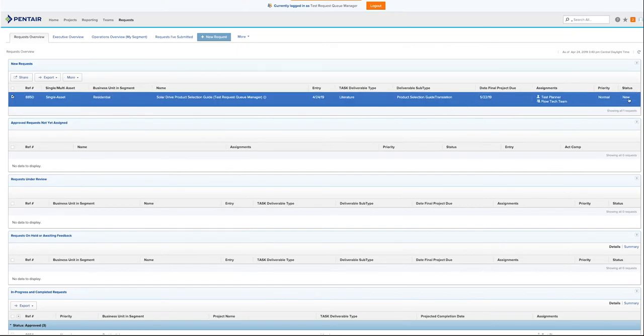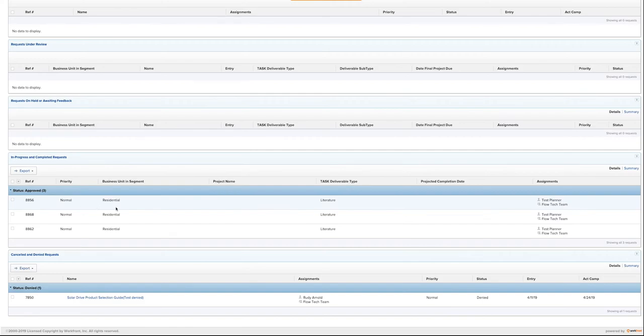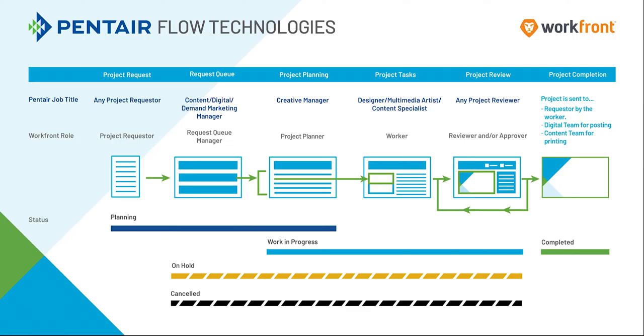When the project is approved, it will appear down here in your in progress and completed requests. Since these projects have now been approved, it will be up to your planner to convert them into a project and associate all the proper tasks. This concludes our request queue manager training. Next up, we will talk about the project manager training, where tasks will be attributed to new projects that have been converted from requests. Thank you.